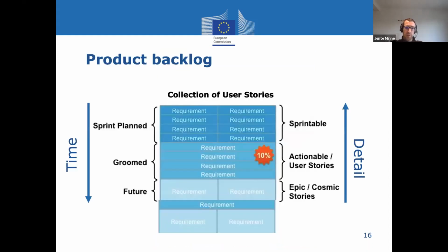And all these user stories will create what we call a product backlog. We have seen the previous slide, that's when your user story is done and you can give story points or measure the time needed to develop it. But of course, not all your user stories you will develop right away. You might have some wild ideas of things that you will do in 2 years. You're not going to lose time defining all these things in detail, because you lose way too much time and resources for things that might change in 2 years.